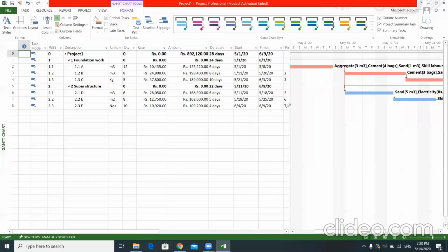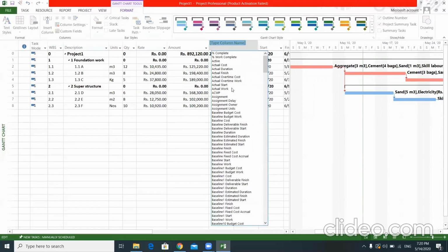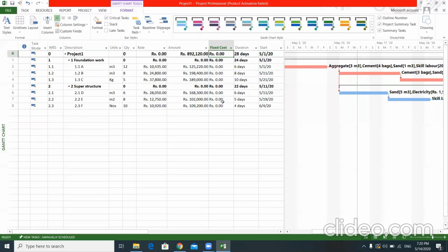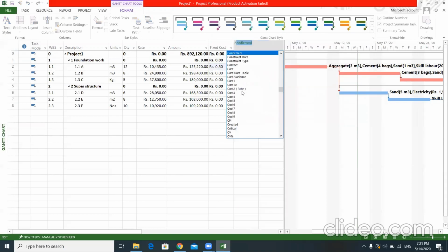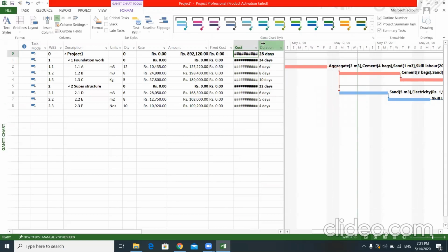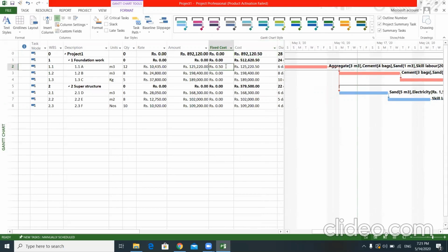So here, of course, we have to include them as well. These are base costs without profit and overhead. So what I'm going to do here: there's a column called fixed cost in MS Project. When you add something to this fixed cost column, say I add 50 cents here, and I get the cost column, you can see whatever I add here is automatically added to the cost column, right? If I delete whatever is in the fixed cost column, it is deducted from the cost column.